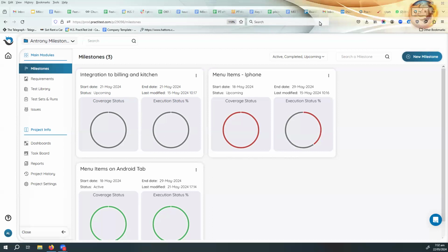So, for example, if we want to test a phase, we can look at a UAT phase, or we can look at a particular SIT or perhaps a functionality and draw it at a higher level. It will include a group of requirements. It's more like an epic level, but it could also be, instead of being functionality based, time based as well. So you're looking at a particular month, perhaps a couple of sprints or one sprint, and you're going to base your requirements on that. And having taken that into account, you're able to look at your product testing and see whether you're on track with it. And if necessary, make changes to your testing process as well to make sure that your milestones are reached in a timely fashion.